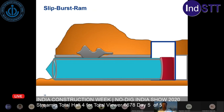So here I'm going to get into the technology piece of this, and this was a solution that the contractors proposed. Our role on the project was to make sure that what they were proposing, if they could do it, would meet our engineering requirements, right? The arrangement was that the contractor had the risk to make sure that this worked. Since they were proposing it, it wouldn't fall back on Jacobs to say, well, you designed this, it wasn't possible. No, the contractor said they could do this, and wanted to know would it meet the requirements.